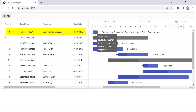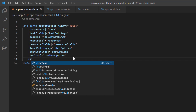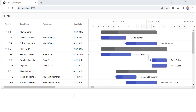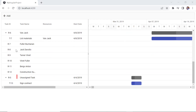Next, I will show you how to visualize the list of tasks assigned to each resource in a hierarchical manner. I set the view type property to the resource view option to achieve this. You can now visualize the list of tasks assigned to each resource hierarchically. A task with no resource assigned comes under the unassigned task category.